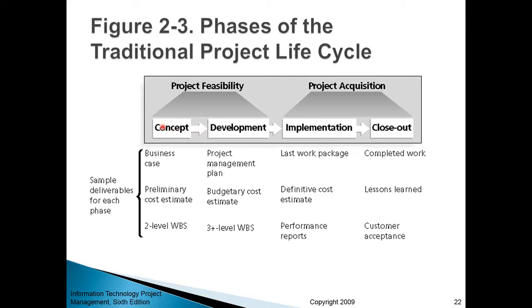The concept definition phase, where you come up with an idea for a project, and those are the kind of deliverables that you will submit. For example, a business case, which is a document that justifies initiation of a project from a business standpoint. Preliminary cost estimates, meaning a rough draft of the overall budget for the project. And then a second level work breakdown structure. It means a high level sketch of the kind of steps that you need to go through to fully implement that project. So that's the initial concept phase.